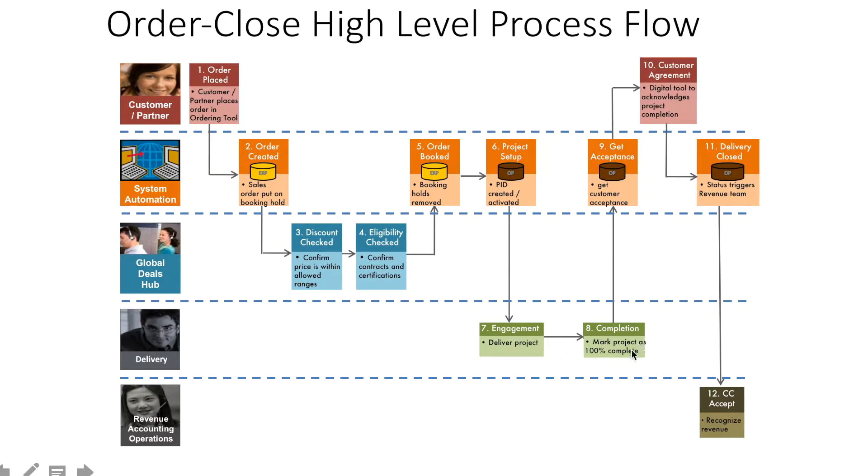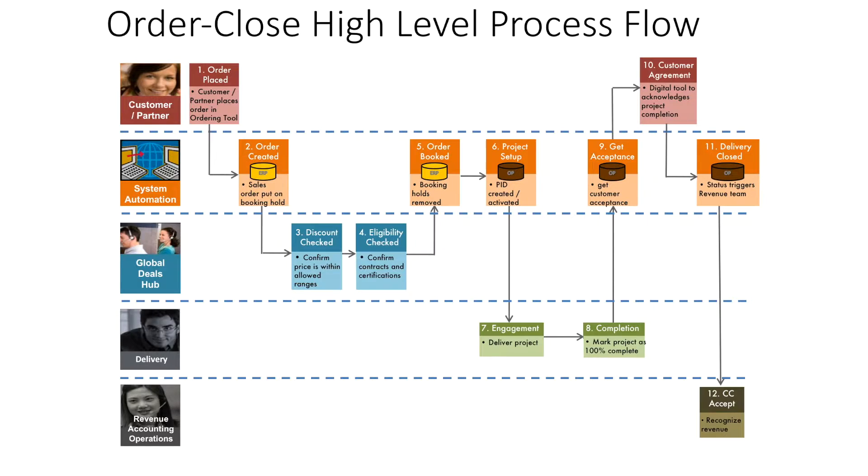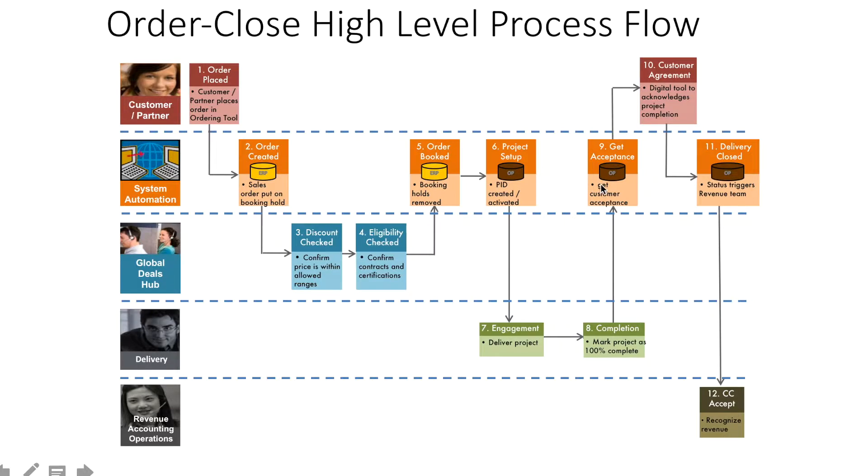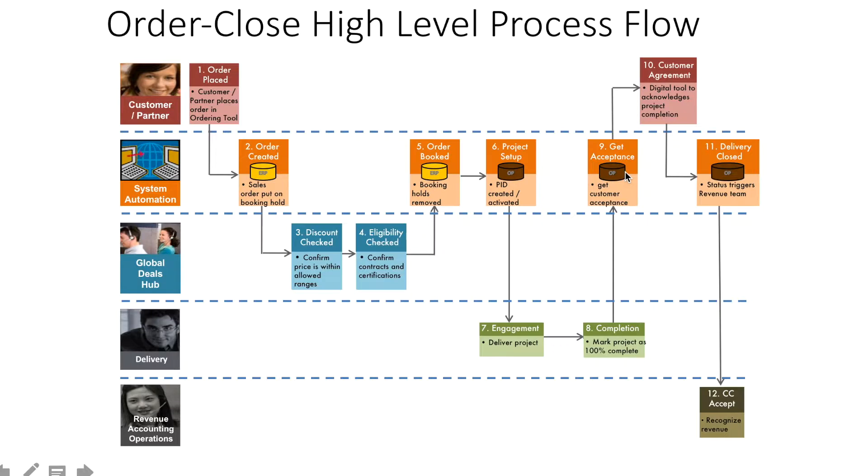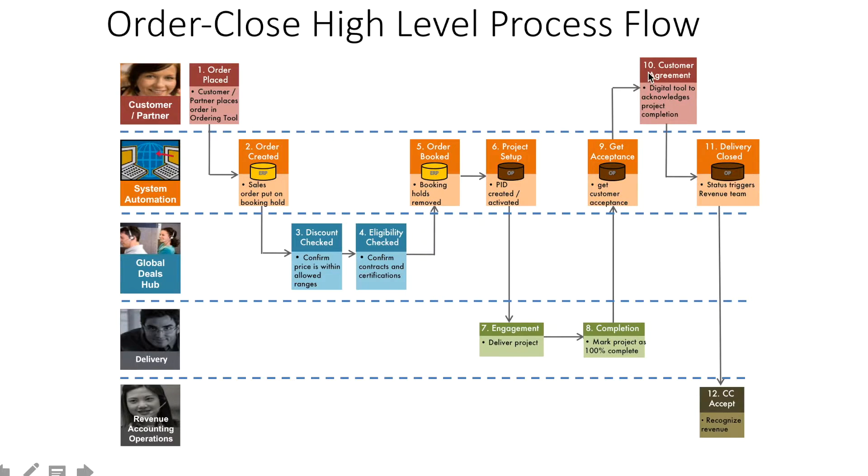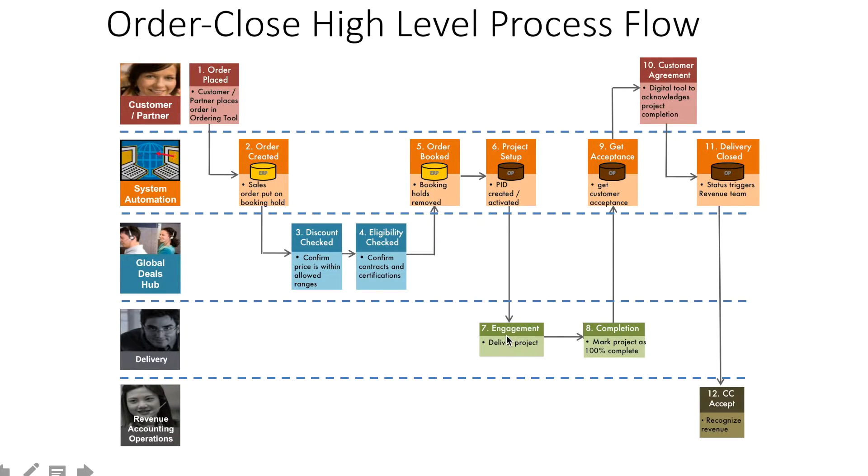Once complete, the program manager marks the project as 100% complete through a set of processes. Different companies have different procedures. This project completion triggers a process to get acceptance from the customer, who signs and agrees that the project has been delivered. That's when it goes to delivery close.